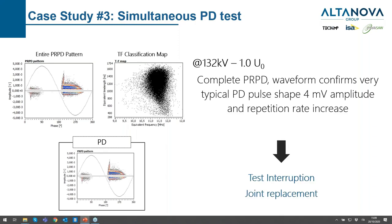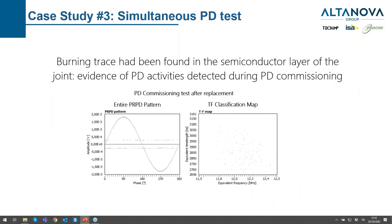As normal procedure, they tried to increase the voltage to validate it was real internal PD without causing a joint failure. By increasing to 132 kV phase-to-ground, it was possible to see the entire PD pattern — the pulse shape was slightly higher, with a peak of 4 mV. The test was interrupted, the joint was replaced. After replacement, the noise threshold was less than 1 mV and no PD signal could be seen.